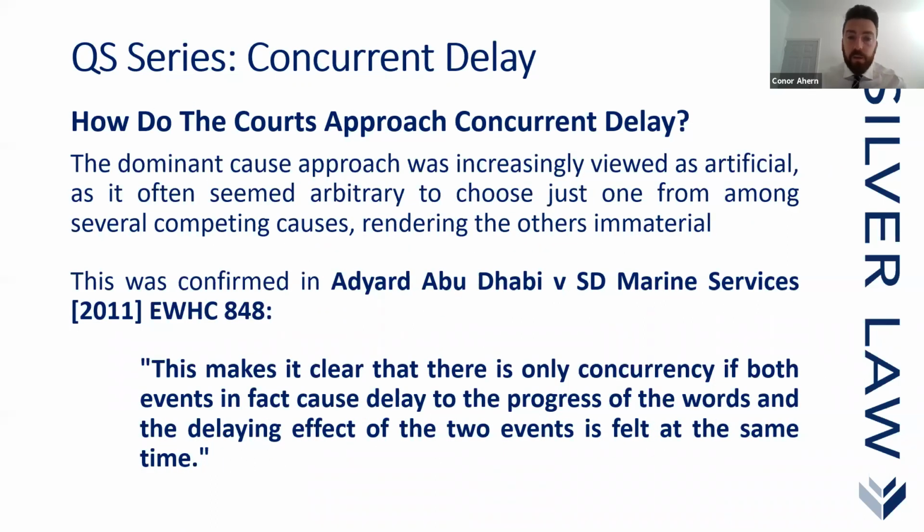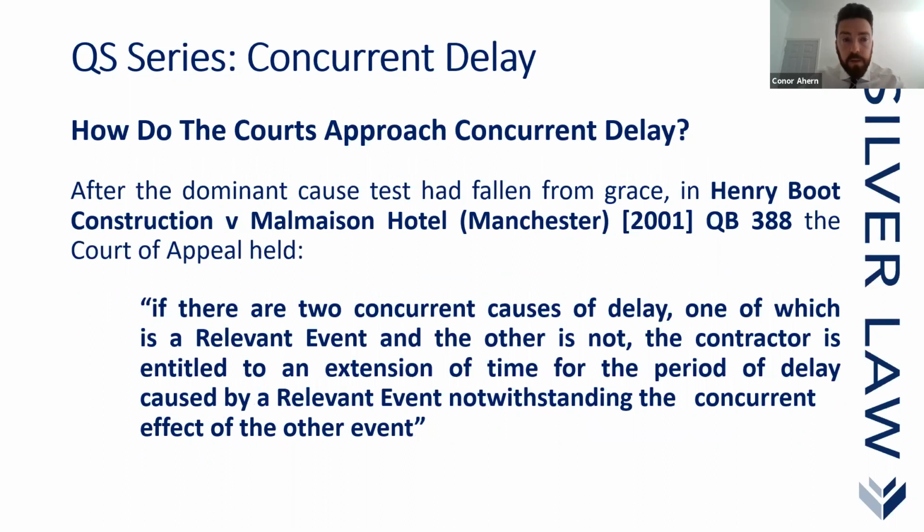This is confirmed in Adyard Abu Dhabi versus SD Marine Services, which makes it clear that there is only concurrency if both events in fact cause delay to the progress of the works, and the delaying effect of the two events is felt at the same time. So again, you can see there's a bit more consistency coming into the definition of what concurrent delay is.